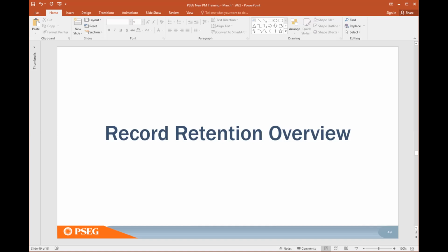Again, the importance of leveraging that cost estimation tool to get a really solid budget as you move forward with your business case for executive review and approval is going to be critical. As Suresh pointed out, changes to budget require a justification document. So that's why it's critical to leverage that cost estimation tool to get a solid starting budget.